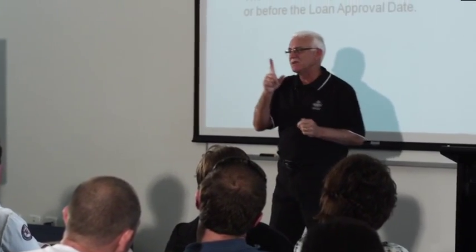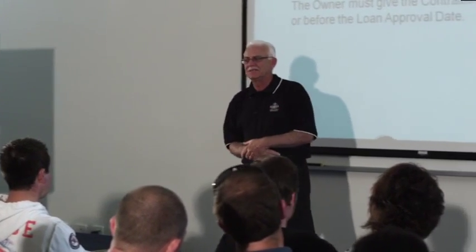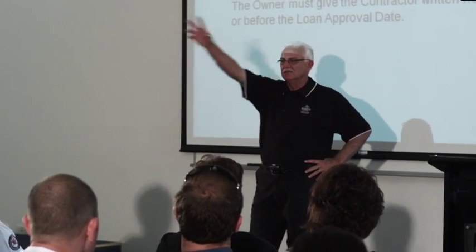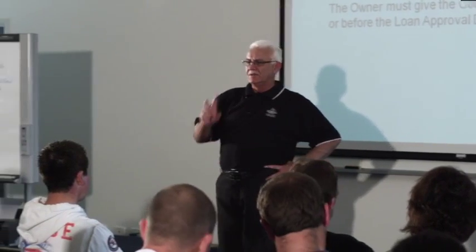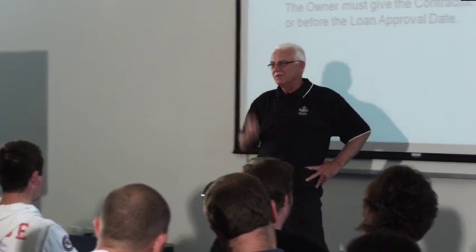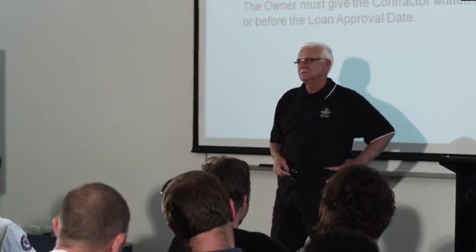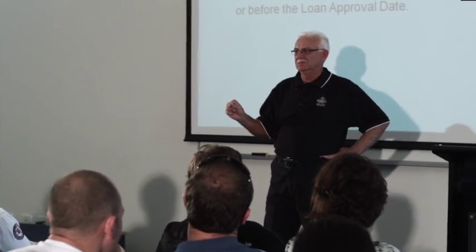You've got to secure it if they're saying that they're going to pay cash. How do you know that auntie's going to pay for it as a gift? Again, same thing. You go and get the money off auntie, put it into the trust account, or let's have a trust account with auntie, right? That when I put in my claim, and if it's a variation, you put it in with the next progress claim, I will get paid. You've got to secure your own living.